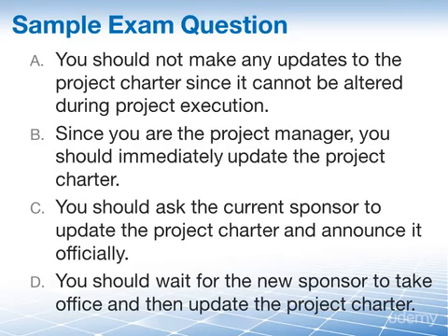The correct answer is, of course, C. You should ask the current sponsor to update the project charter and announce it officially. Remember who the owner of the project charter is. Since the project sponsor is the owner of the project charter, it is his or her responsibility to transition sponsor responsibilities to the successor before leaving office. Asking him to update the project charter is the correct next step.